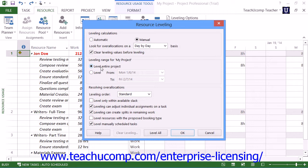Note that the settings that you make here will be applied to all project files, not just the currently selected project file. For this reason, it is recommended that you do not select the automatic choice within the Resource Leveling dialog box, as that will apply resource leveling to all project files whether you want it to or not, which can cause more problems than it corrects. Leave the manual option shown in the Leveling Calculation section selected to allow for resource leveling only when you select to apply it.